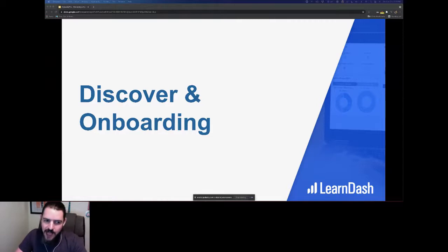When I plan a project, I consider the discovery and onboarding phase, the project management, all of that stuff, at least 25% of the project. That goes into ticket creation, that goes into back and forth emails, meetings, time for the team to understand stuff.